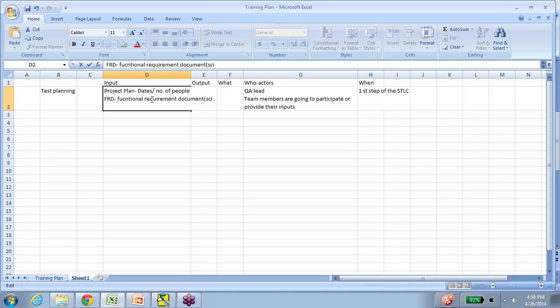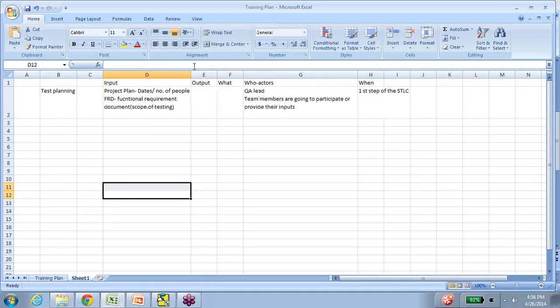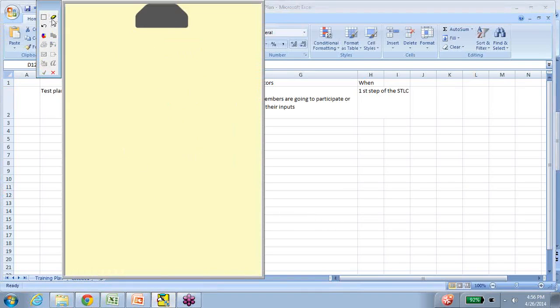This is to understand the scope of testing. See, we have to know how much is the extent of the application. Say, for example, there is an application that runs 10 web pages and has probably 150 features that are implemented on it. So you need to know the size of the application, the complexity of it. You need to do some sort of analysis to come up with how much time it's going to take for us to test.